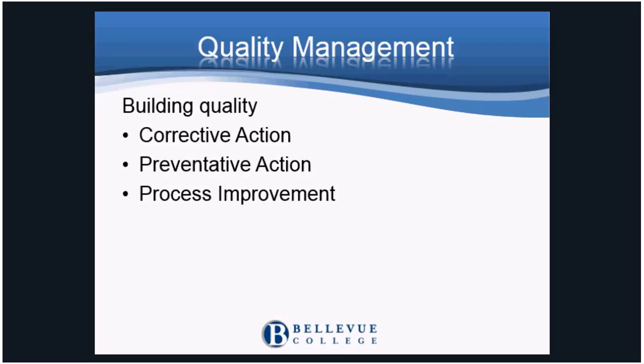A better approach is to plan and execute processes that prevent the defect or risk from occurring. The cost of rework is avoided because a defect does not occur, and we eliminate the extra costs of scope, schedule, and budget. Preventative actions are planned actions to avoid defects. Process improvement is the constant attention to making proactive improvements to a project. Process improvement is the quality approach of continuous attention to the prevention of defects that occurs during the planning and execution instead of in just the planning phase.